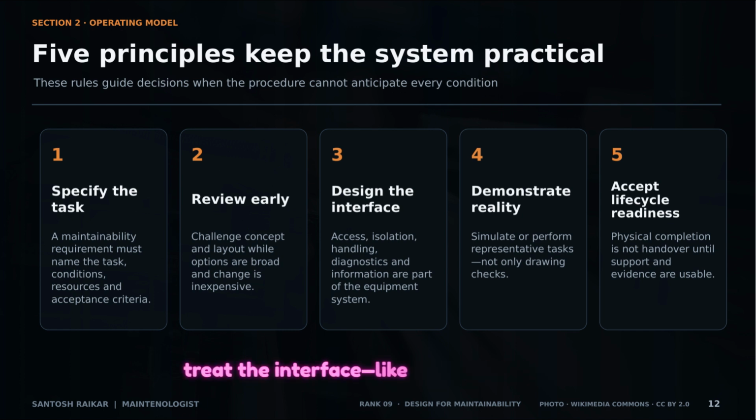Third, treat the interface, like lifting points and diagnostics, as part of the equipment. Fourth, demonstrate reality through simulations. And fifth, only accept the project when the lifecycle support, the data and tools, is actually usable.